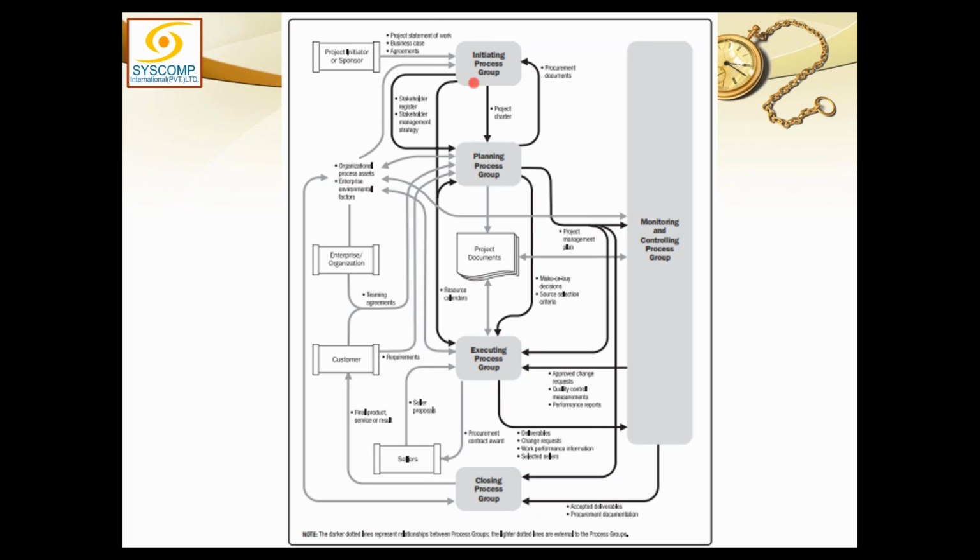But remember, writing the project charter is not the project manager's responsibility. He might assist the project sponsor in writing it, but this is not his duty, and he is not a signatory author of the project charter.